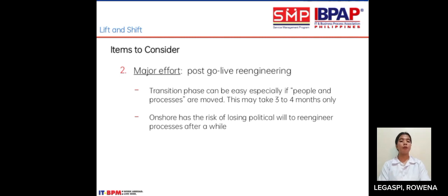So number 2, major effort post-go live re-engineering. The transition phase can be easy, especially if people and processes are moved. So this takes only 3 to 4 months. Onshore has the risk of losing its political will to re-engineer the process after a while.